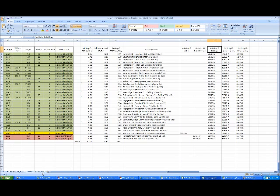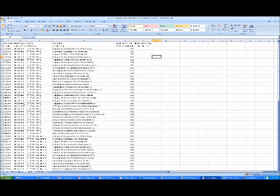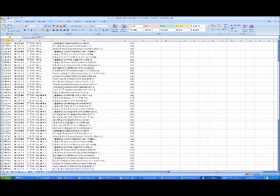And then we leveraged the import feature of P6, and we figured out what the data structure needs to look like in a spreadsheet to import data into P6 for our new schedules. So these are the activity IDs from the previous tab, and those are for milling. So we just copied that vector over along with the addresses and the durations. We copy